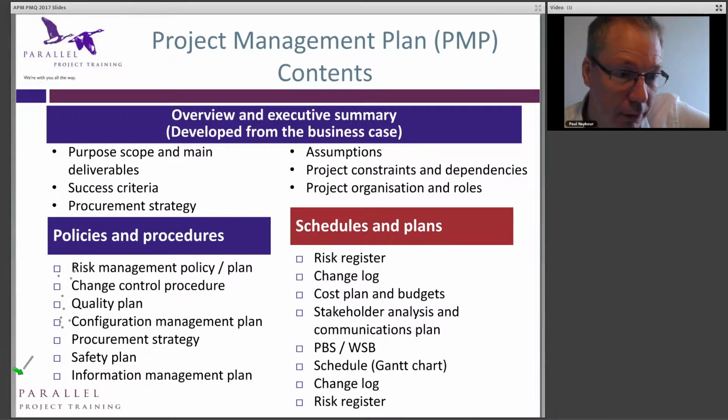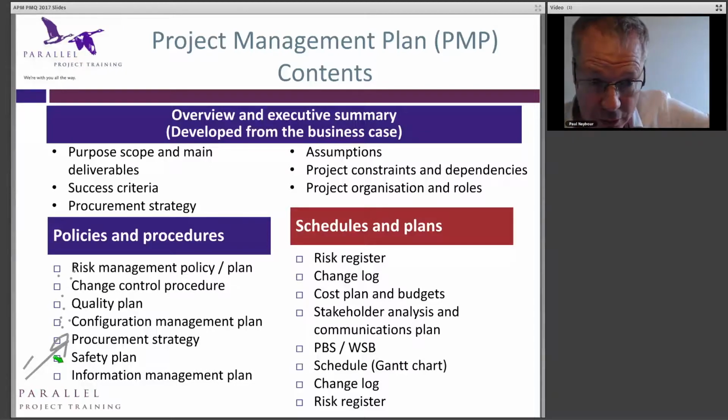Quite often in many organisations, they'll have a common method that they use to develop these. These will be used across multiple projects, because clearly you want one document control system in your organisation. You don't want each project management team going off and developing their own document control and configuration management system. So these are quite generic and they're quite stable, so if your configuration management system works, then you'll continue to use it and you won't change it.